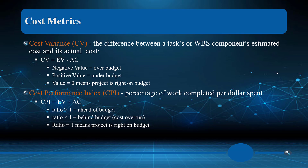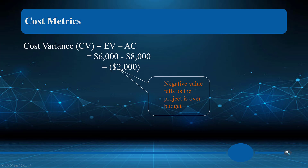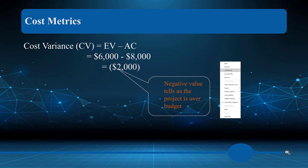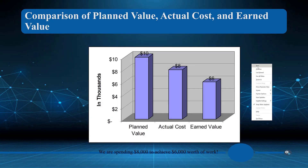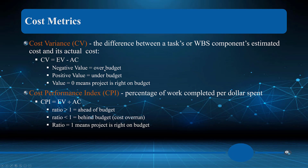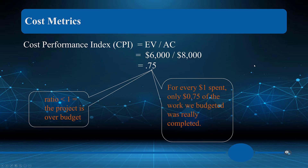We're through task three of our five tasks. By doing this calculation we come up with a negative value, and we know that a negative means we're over budget. Don't let this confuse you — the earned value is what we expected, the actual cost is what we spent, and we are simply over budget.